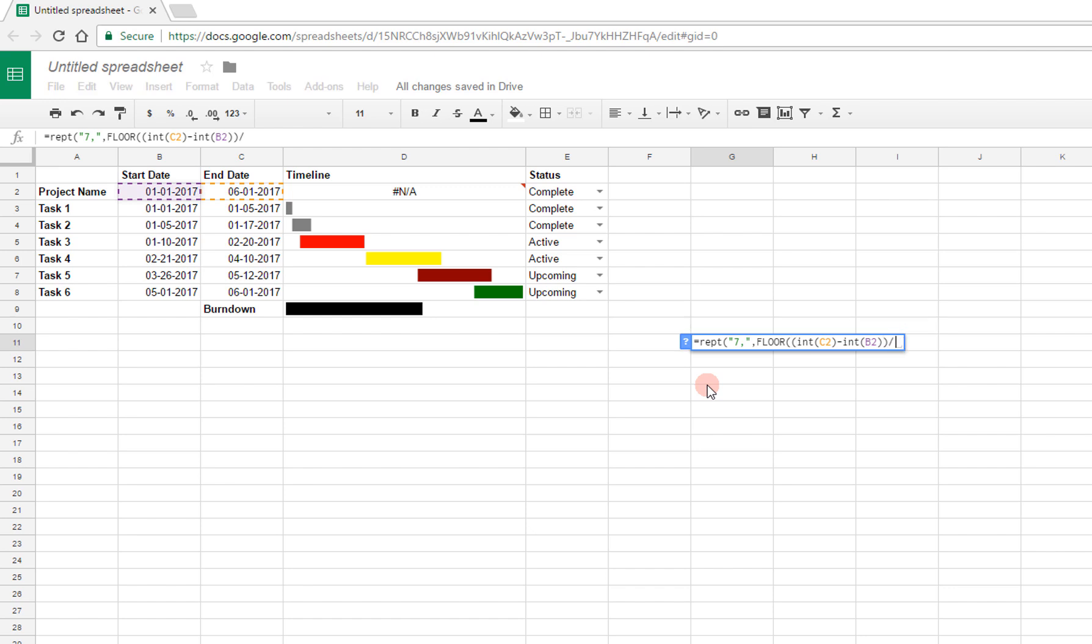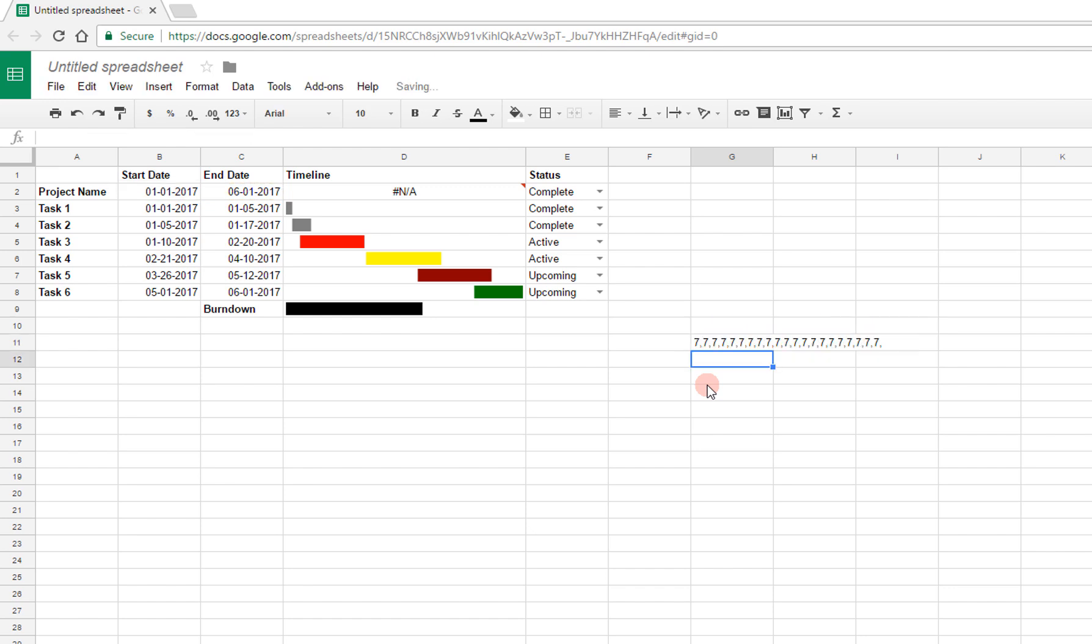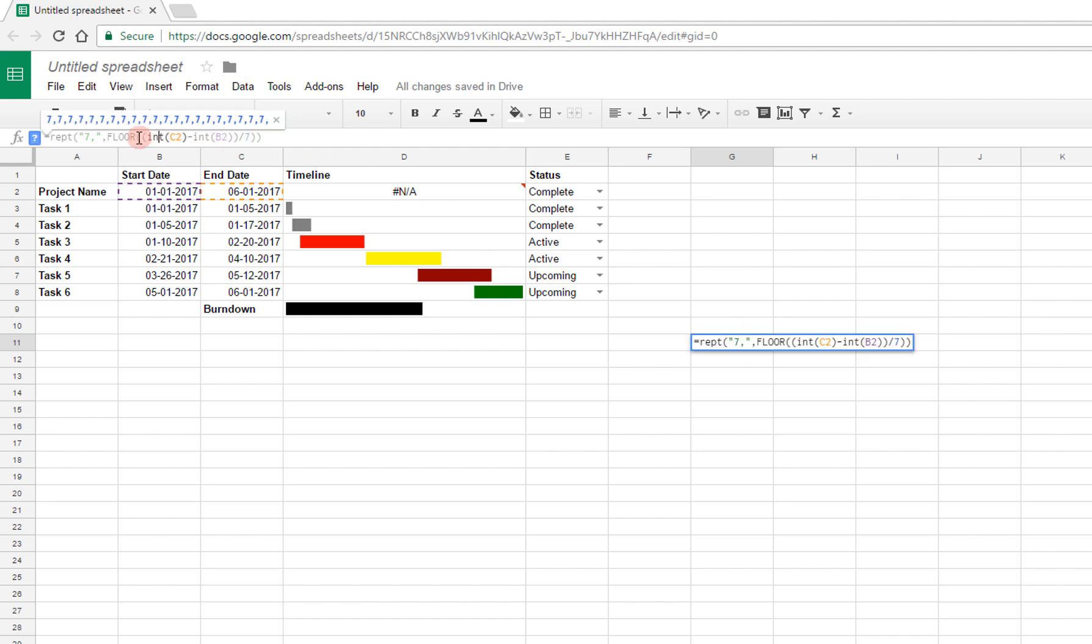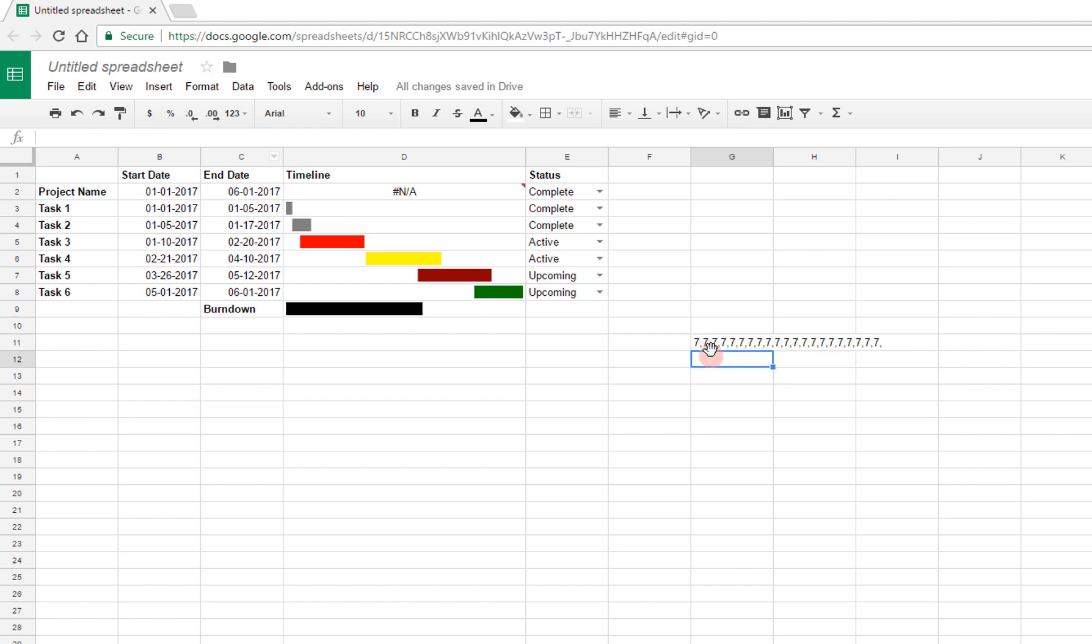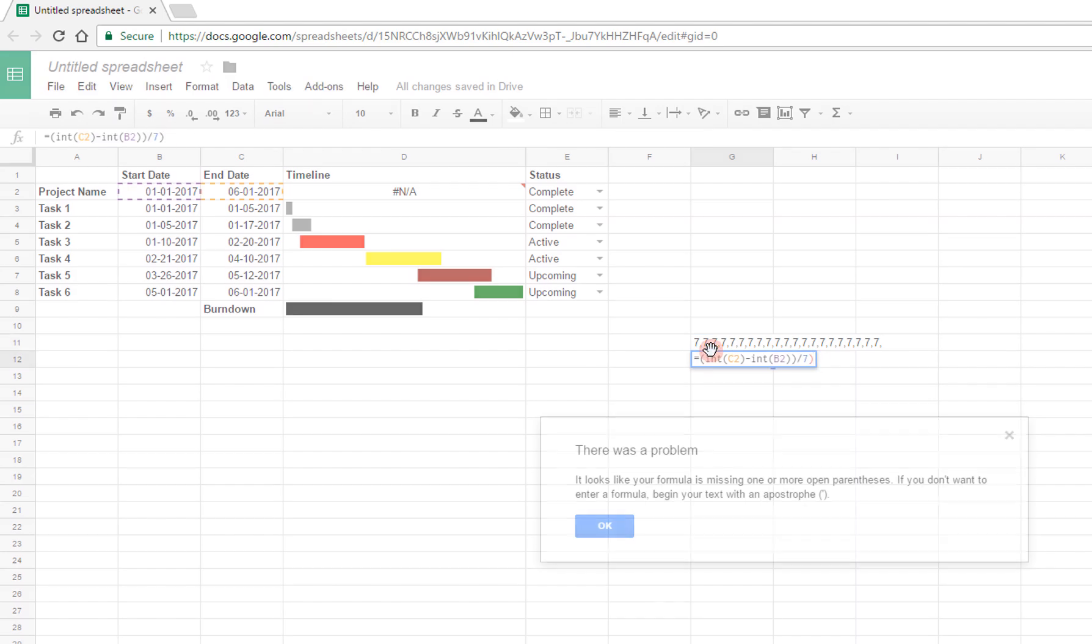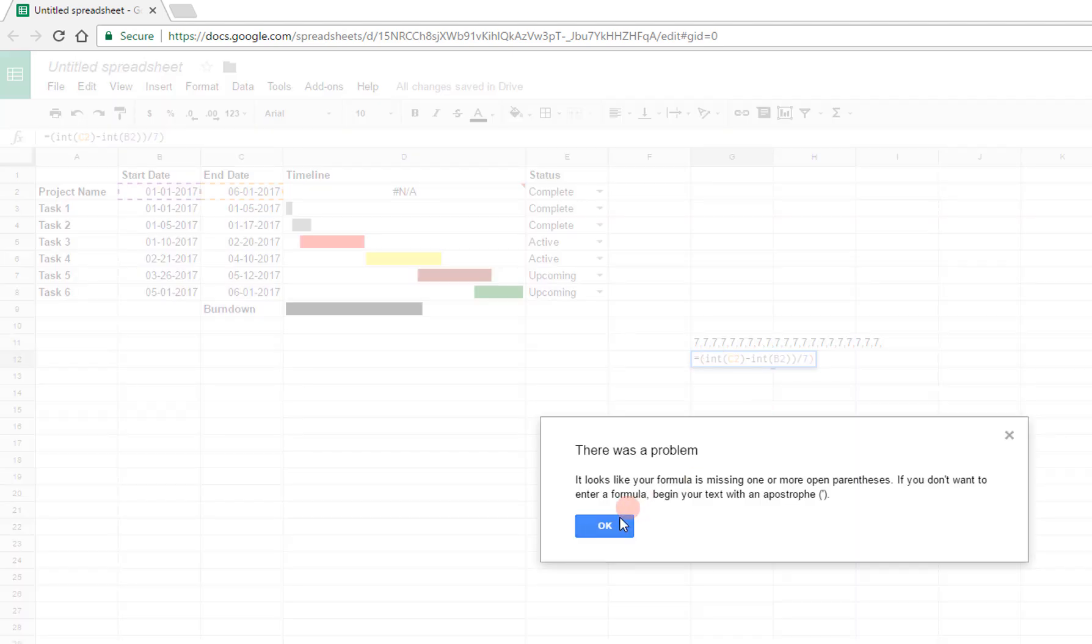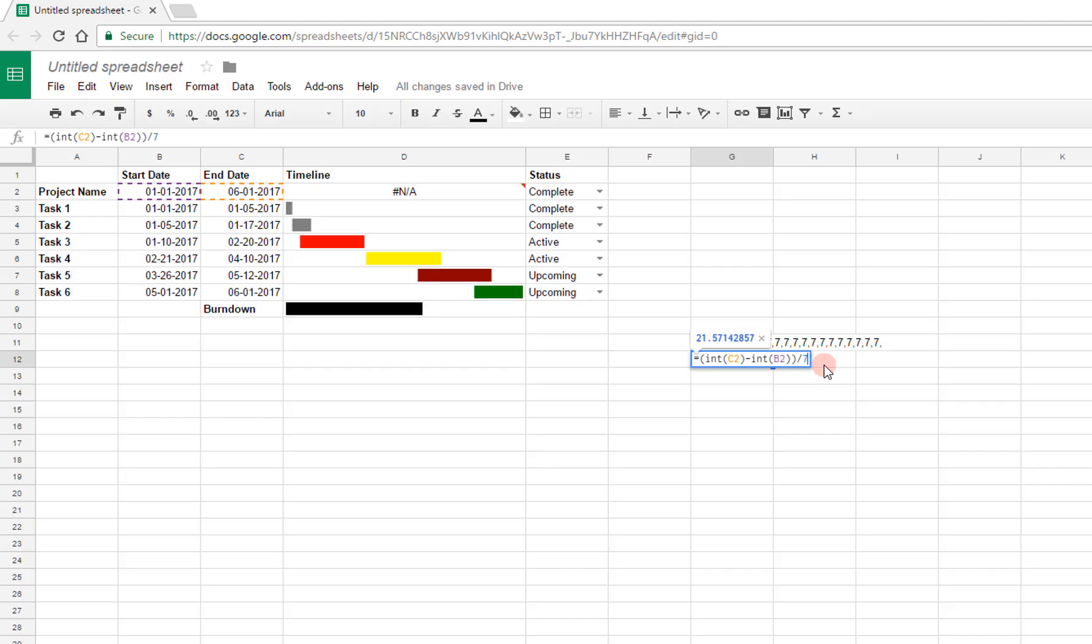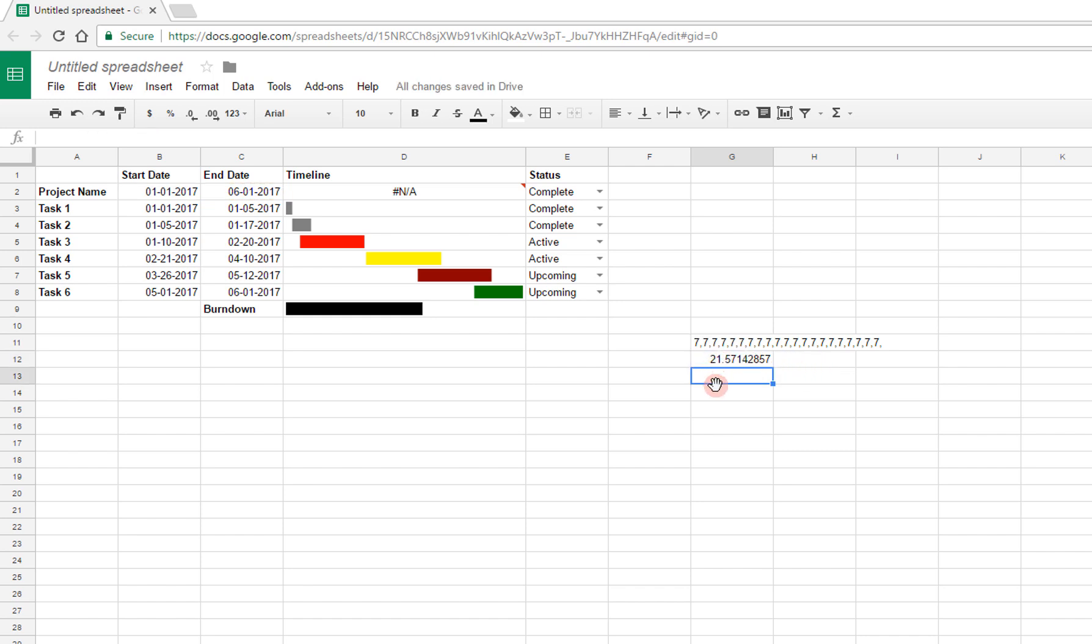So I'm going to say floor of int C2 minus int of B2 divided by 7. So then you can see that it's going to repeat this that many times, because there's a number of weeks that there are. In fact, if I just take that calculation on its own right here, and I put that over here, I have an extra parenthesis there. If I do that, I get this number, 21.57, and of course I can't repeat it that many times, so instead I want to floor that and make it 21 repetitions, because I have 21 full weeks.